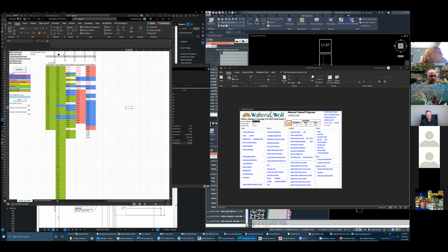So here on week 2, the shop will build 100 units, but in the office, we have to build 78 unique. So it's a very poor ratio of unique units to total units. So trying to meet the time it takes the shop to build one unit, sometimes we would need more time than the shop. The shop can put a lot more people on to assemble one unit than in the office.